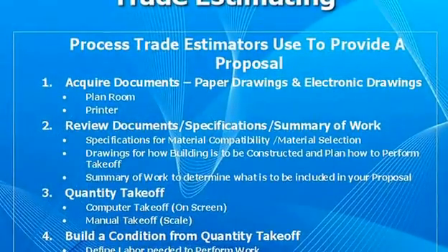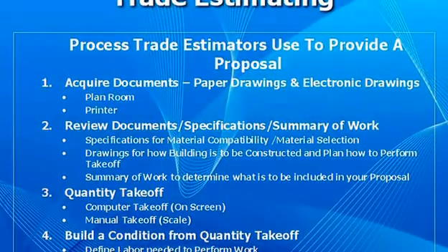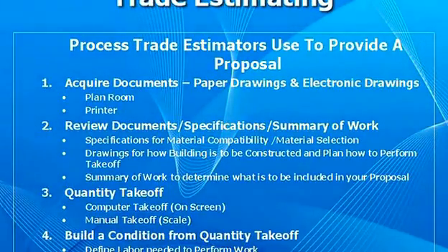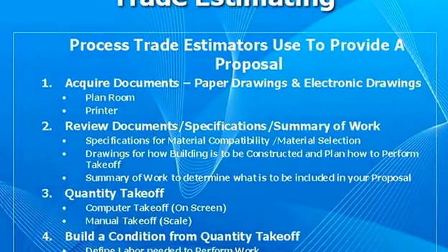After you decide you're going to bid this job, the first thing estimators do in the trades is go through the specifications. You look at which specifications pertain to your company and your scope of work. We may bid some of the specs, or all the specs that our company can deal with. That's when you make your decisions on how you want to take apart your estimate. For mine, I can look to see: is there plaster in this job? Is there spray fireproofing? Are there acoustic ceilings, wood ceilings? It at least gives you an idea of what's all involved.